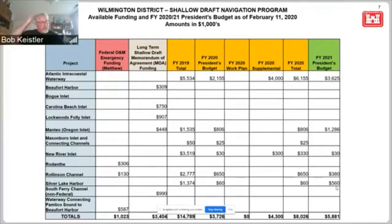We do have the ability to identify funding needs. And actually, we're going through a drill right now to identify funding needs that we would need in the first quarter. As all of you know, the Corps is project funded, and just because it's in the president's budget now, there's no guarantee that it won't change, and nobody can tell you when it's supposed to come out. But that being said, in the CRA, we're given an opportunity to request funds based on need. So if we had a contract that was going to be awarded in the first quarter, or a need for something like this that is highly important to an area from a life and safety situation, we would rank this as a high priority for O&M funds. There's a good chance. I'd be shocked if we didn't get permission to get portions of this federal budget early in the fiscal year next year.